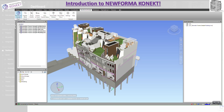As soon as you log in and select your hub and project, you'll be able to see the clashes tab, which helps you group clashes and send all the clashes as issues to assign to trade partners. You can also sync clash status — there's a two-way communication between the plugin and Navisworks. You send the clashes from Navisworks to BIMTrack, and when clashes get resolved, they send back to Navisworks and get closed out automatically. We'll go through all of these settings in future videos.